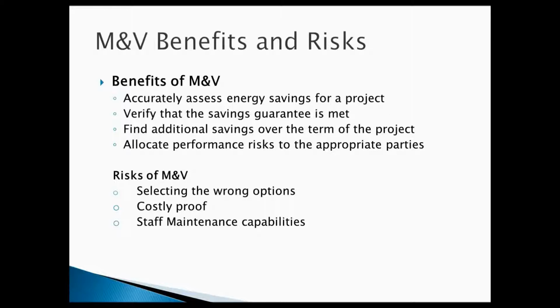To ensure that your savings is persistent, it's a good idea to consider continuous commissioning where everything is kept going efficiently. The other thing with it is if you're not seeing your savings, you've got that recommissioning to be done during your project.